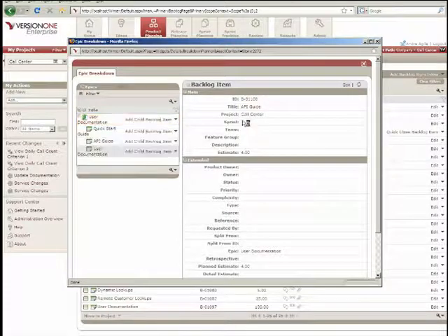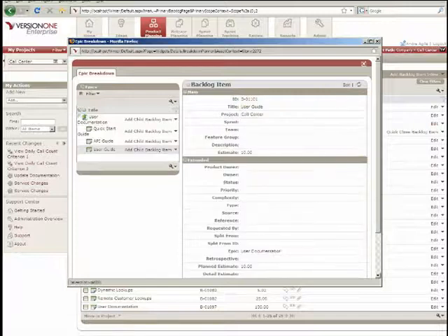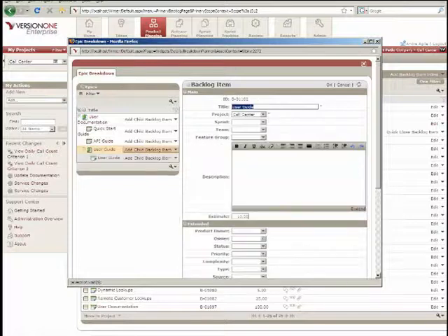And what else do we have? We have perhaps a user guide. Now, that's probably going to be, let's say, a 10. But as we're thinking about it, and as the team's collaborating and talking to the product owner, we say, product owner, I'm a technical writer, and I can't write a user guide in 2 weeks. We have a 2 week sprint, so we can break that down even further in version 1.